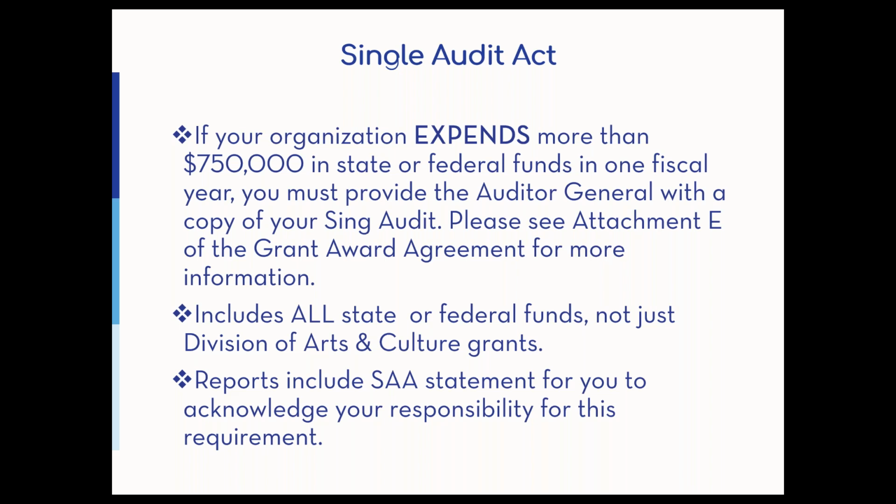You might not necessarily have to do an actual audit because the audit depends on whether you expend $750,000 in state funds or in federal funds in a single fiscal year. So you might not reach that threshold for the audit, but you are required to do the certification form. And these certification forms are accessed through our grant system also.